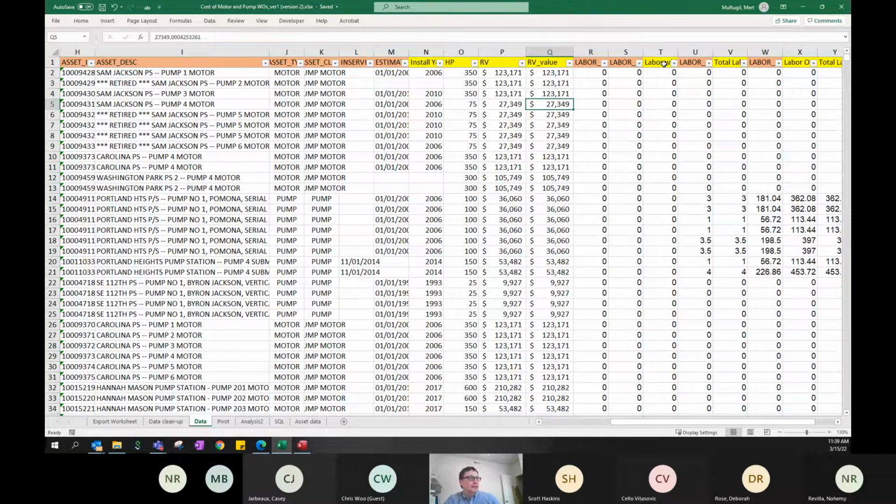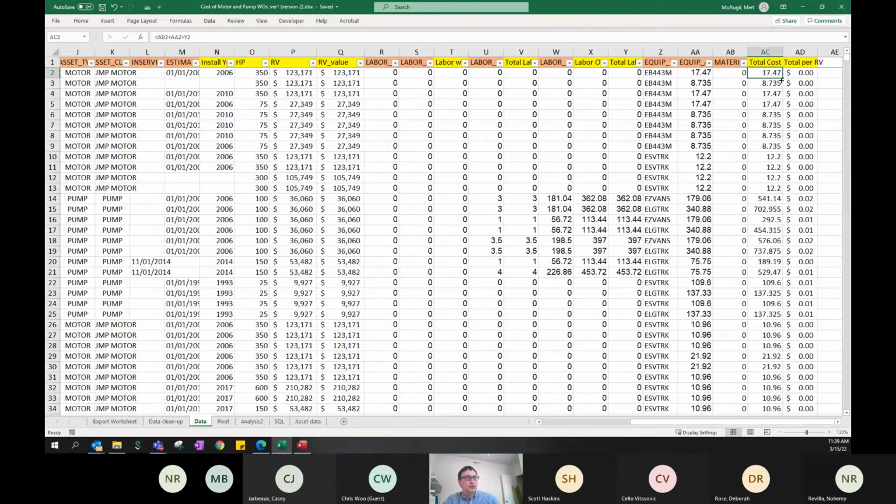And then we have the labor totals after the indirect cost adjustment has been added, that thing I mentioned about multiplying it by 2. And that gives me a total cost for each work order and task combination. So we have the material, equipment, and the adjusted labor costs all added together, so that's one final cost item for a specific work order and task combination.